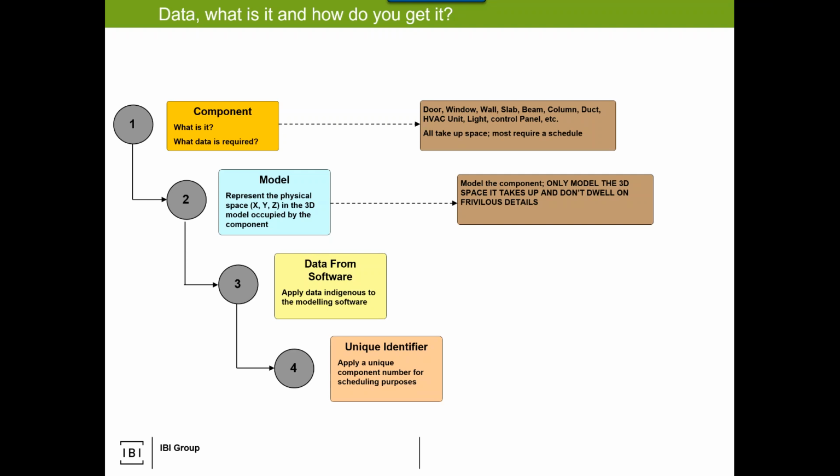Mullions could be 50 millimeters wide. Once they get fabricated, they may end up being 45 or 38 or whatever the number is. I don't really care in the BIM world. I want to say this is a window. This will be the manufacturer as I specify. Once we get the shop drawings, we need to validate that it's fitting within the dimensional constraints of the design, and then it gets fabricated.